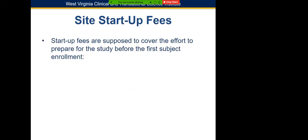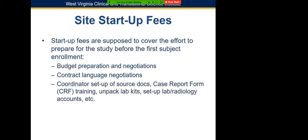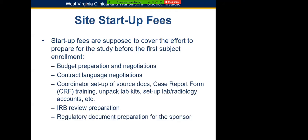I mentioned startup fees are supposed to cover the effort to prepare for the study for the first subject enrollment. That includes budget preparation and contract negotiations. The coordinator spends a lot of time reviewing the protocol, doing case report form training, lab kits, and setting up lab and radiology accounts. They have a lot of work to put in before any subjects are enrolled, so the startup fees usually cover that time. It also includes, for regulatory, the IRB review preparation and the document preparation for the sponsor.